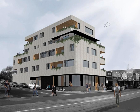So you really need to have your box of lights and your door hardware and your tiles and everything sitting somewhere ready to go, because it all happens more quickly. Yeah. And that's why we talk about the water mitigation and water egress through these buildings is so important, because if you do want to have those trades follow on from structure that early, you really need to be managing that very, very closely. So you don't want to be covering up wet timber. So that's something that we're doing a lot of work on at the moment, and understanding how we mitigate that water egress through buildings, these particular buildings.